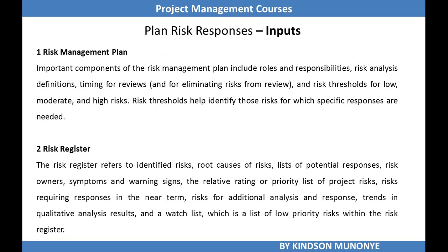Of course, clearly we need the risk management plan for us to plan the risk responses. Important components of the risk management plan include roles and responsibilities, risk analysis definitions, timing for reviews, and the risk thresholds for low, moderate, and high risks. A risk threshold helps identify those risks for which specific responses are needed.